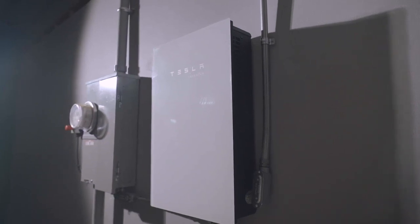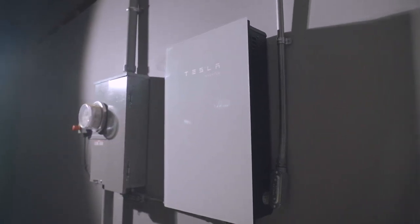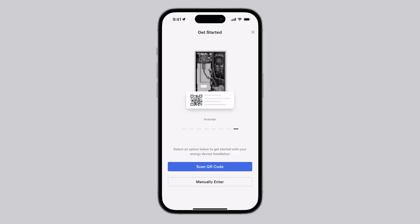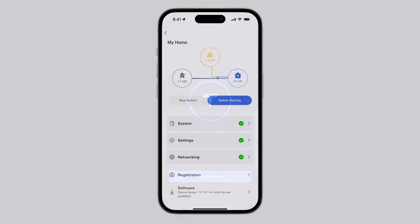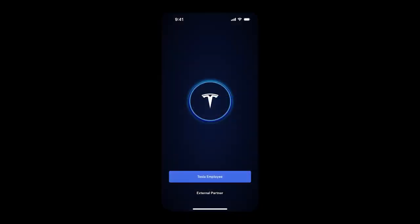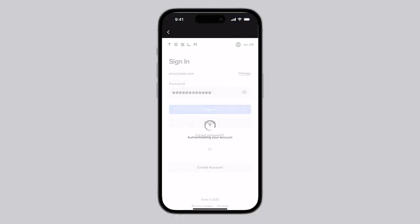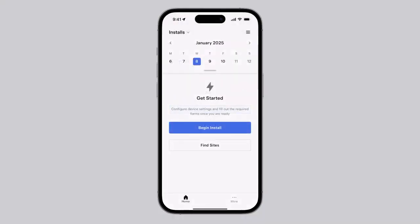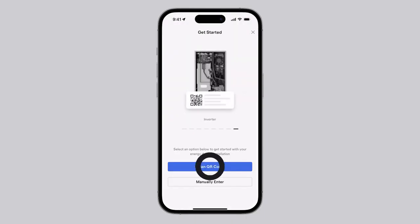With the Tesla Solar Inverter closed and turned on, the next step is to commission the equipment with the Tesla One app. Launch the Tesla One app and log in with your Tesla account credentials. Select Begin Install, then select Scan QR Code.